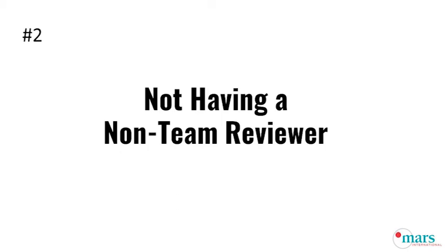The hardest spec mistake to find is the spec item that isn't there, and the reviewers will have a much better chance than you at picking up those kinds of absences. If a spec says it should go up to 110 degrees, but you don't say whether that's Fahrenheit or centigrade, that's a really easy kind of thing to find. Something that's just written down in the spec that's not clear or not right, that's going to be easy to find.